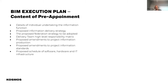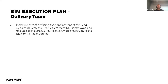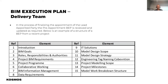ISO 19650 itemises what requirements are there — we'll dig into more of that later this week. The content of pre-appointment includes details of individuals undertaking the information function: who is going to be managing the information and at what stages along the project lifecycle. It will change from stakeholder to stakeholder depending on the project type. How are we going to deliver information? Is it common data environments? What platforms and software? Is it IFC when communicating? Is it Revit format? The responsibility matrix — which we dig into further in the presentation — helps understand which stakeholder does what, when, and what type of information is expected.